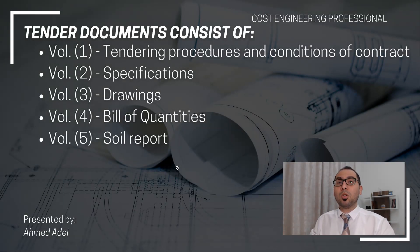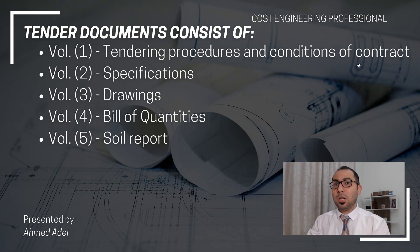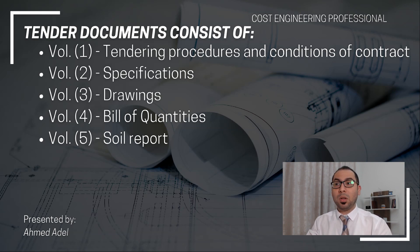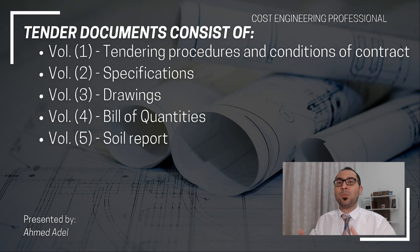These documents consist of five volumes. The first volume is tendering procedures and conditions of contract. The second volume is the specifications. The third one is the drawings, the fourth one is the bill of quantities, and the fifth one is the soil report. I am going to briefly explain each of these volumes, what it contains, and how we use them to price a project.